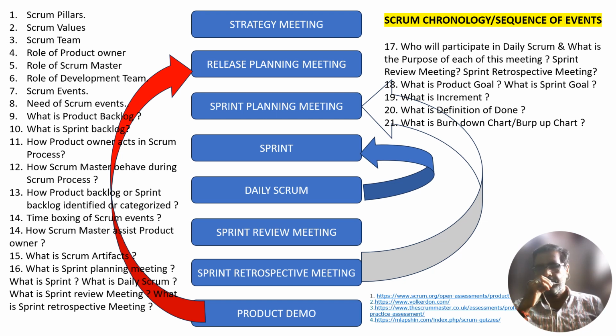In general, we have found that smaller teams communicate better and are more productive. If the Scrum team becomes too large, they should consider reorganizing into multiple cohesive Scrum teams, each focused on the same product, right? Therefore, they should share the same product goal, the same product backlog, and the same product owner.